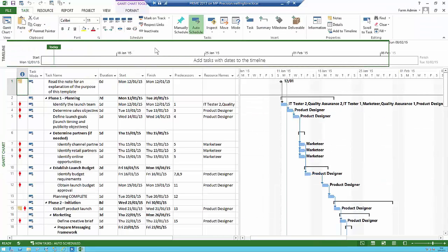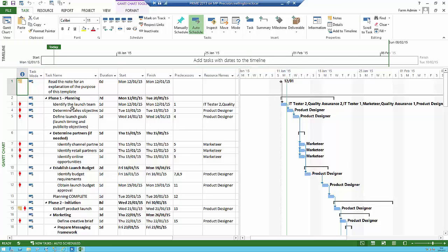Here is your template for the project type that you set up. For people new to Project, you can see that the tasks are listed here, with the duration next to them, and the start and finish. This template has come with generic resources assigned to the tasks — for instance, the product designer is assigned to this task here. As the project progresses and you know who the named resources are going to be, you can replace those generic resources with named resources.